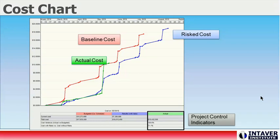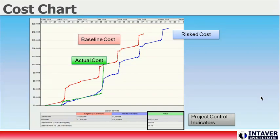The cost chart provides a view of the forecasted cost of a project over time for deterministic and risk costs. As we can see, because the project has a high probability of running longer, it will cost more. If there are actual costs, they will be plotted on the chart, and project cost control indicators are displayed on the bottom right.